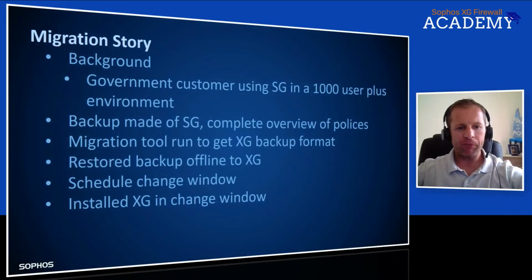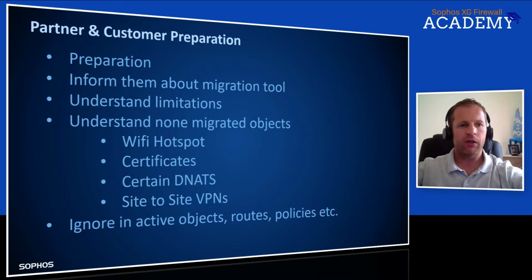So the change window we had was only half an hour at a time. So that's a really short change window to change a firewall, because you can imagine, as a firewall is a key component of this customer, the change windows that we had are very, very minute. And we also had to do it, obviously, after hours. And so the change window was approved for us, and then we installed the XG in the change window time frame we had.